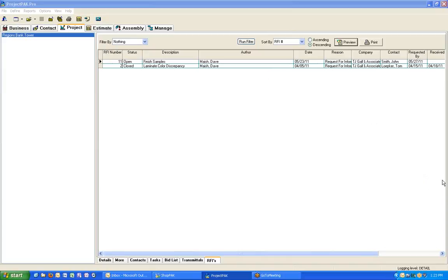And I suppose I could set up a transmittal, but it'd be more like a template. If I had a template for my daily reports, which I do. Okay. What do you have to send on your daily report? Basically, what we did out in the field, how many guys we had out there, what work we did, where we were held up, who was holding us up, those kinds of things. Gotcha.